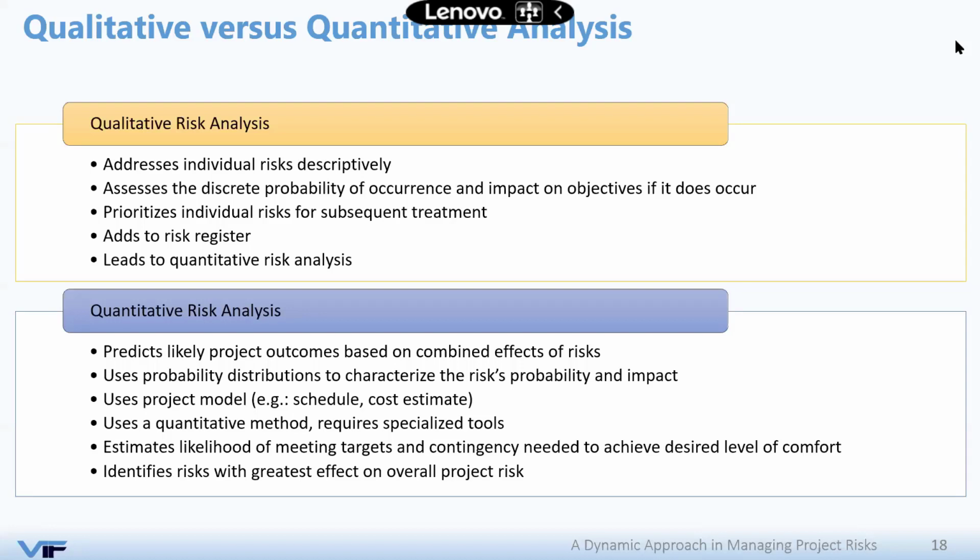The advantage of quantitative risk analysis is that it can give you the overall assessment of a project risk score because you are dealing with numbers here. The scale becomes a 0 to 100, a 0 to a 10. So you start assessing the probability and the impact of each individual risk using numbers. And then you can do also Monte Carlo analysis, which I'll show you a sample of now, and you can check how much these risks will impact my project time and cost and budget. So quantitative definitely is more accurate than qualitative, but it will require effort, it will require investment in some software and such. Qualitative, the advantages of it, it's easy to use, easy to understand, and gives you quicker results. The decision whether to use qualitative or quantitative will depend on so many factors, not to mention stakeholder tolerance, not to mention the complexity of the project, many other factors that will let you decide whether to go with the qualitative or quantitative.